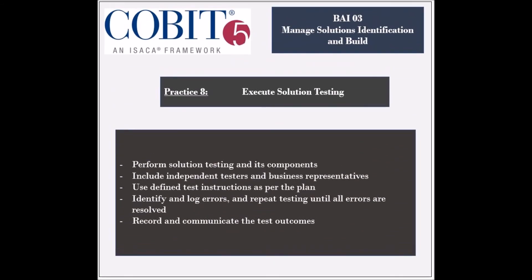The activities involved include executing the testing of the solution and its components according to the test plan. The testers' team should include unbiased members independent of the development team. The testing should be performed in the testing environment only, following the test procedures including integration with the business processes. Any detected errors should be logged and classified, and testing should be repeated until all errors are resolved. The testing outcomes should be documented and communicated with the relevant stakeholders.